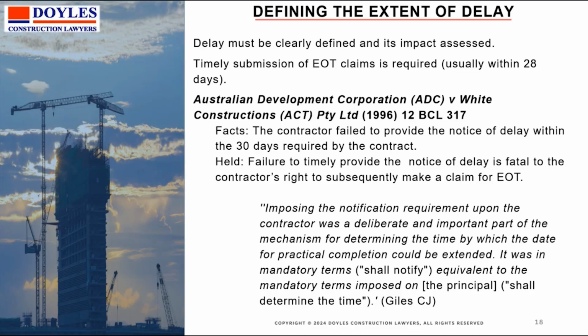And the circumstance is you'll see there that Giles J. explained the mechanism. He said it was included in the contract for a purpose, and the purpose was clear, and the mandatory terms were 'shall notify', and that meant that if you didn't do it, you didn't get your benefits. So it's important that you're aware of that, and as a contractor, on top of it.